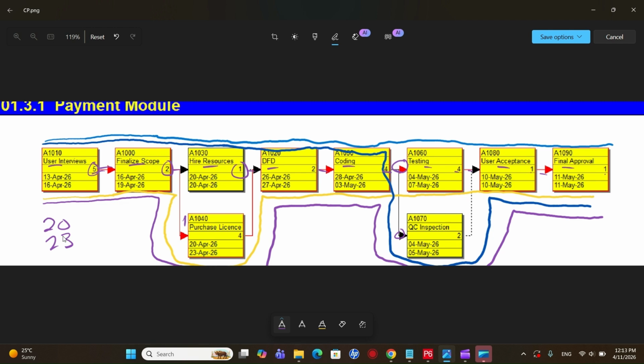Let's add one more. So we have 5 plus 2 is 7, then come down here, 7 plus 4 is 11, then go up 13, 13 plus 4 is 17, and if we come down, 17 plus 2 we have 19, 20, and 21. So here we have 21. We have calculated the duration for three paths. The last path you can calculate following the similar method.